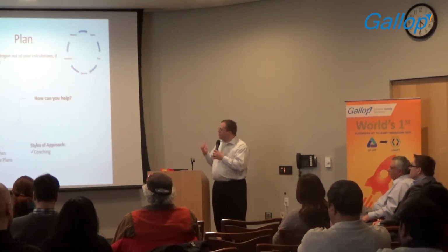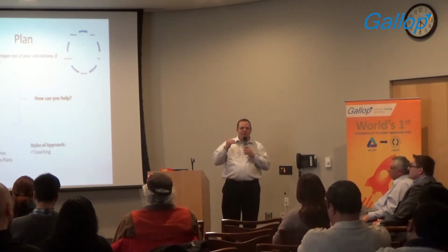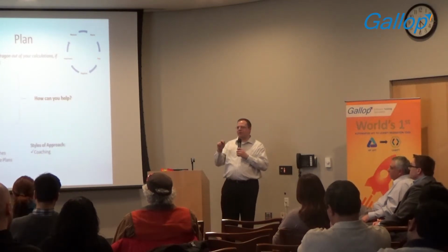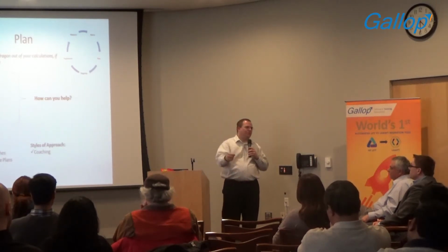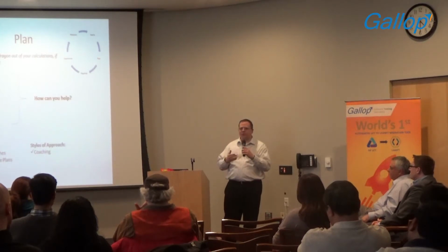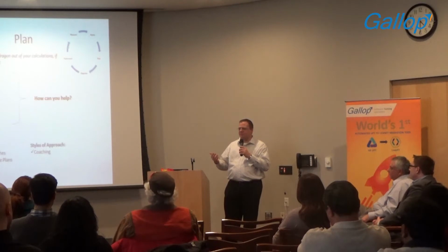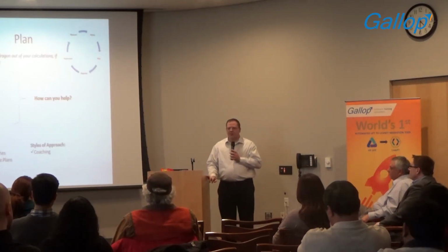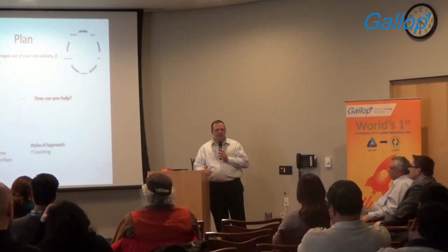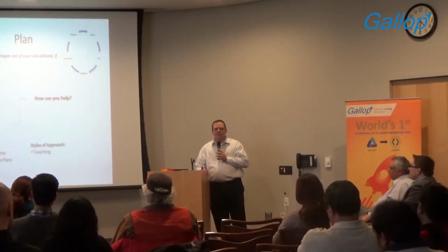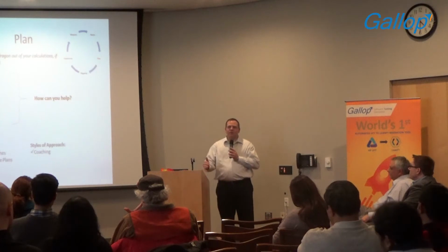The most important part of planning and assessment is to say, what impact am I going to have, and measure it. So for example, you think I can increase my ability to do test coverage by 20% if I bring in a great automation engineer. Right? That might be your hypothesis. Put that as a goal. Write it down somewhere. Document it. Because later on, when you're measuring it, you're going to go back to the plan.